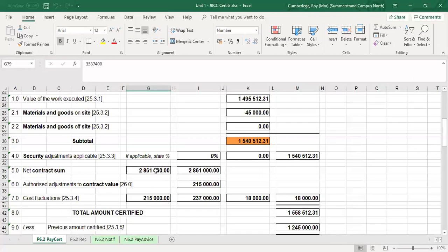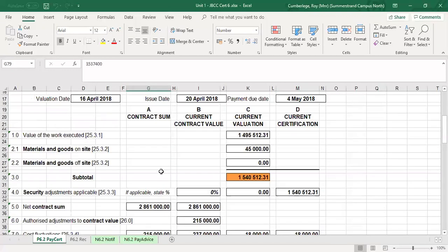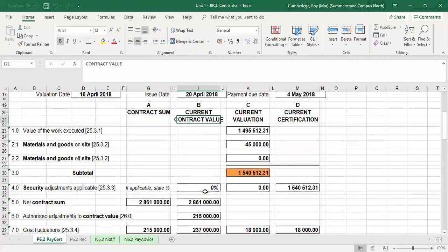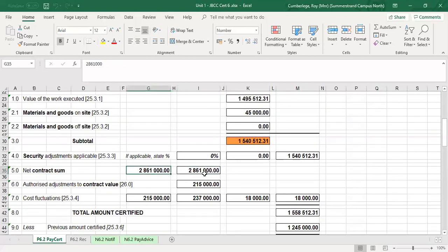It is important to note that the values for column A — the contract sum — will remain fixed from certificate one right up to the final payment certificate. Column B, however, refers to the contract value, which will change — we will have a new contract value because of changes to the scope of work. Your starting point for column B is the net contract sum, so those two blocks will be the same. The only variable items are the values for contract instructions, which are the authorized adjustments to the contract value.